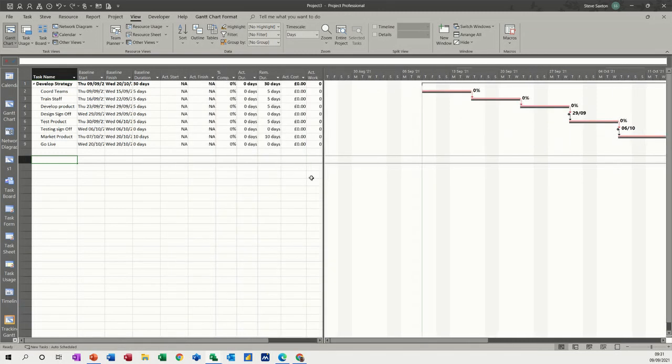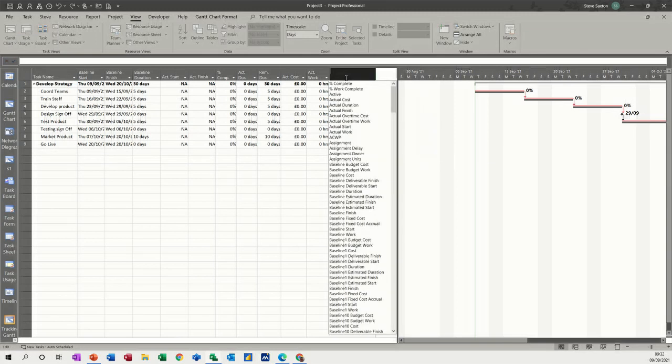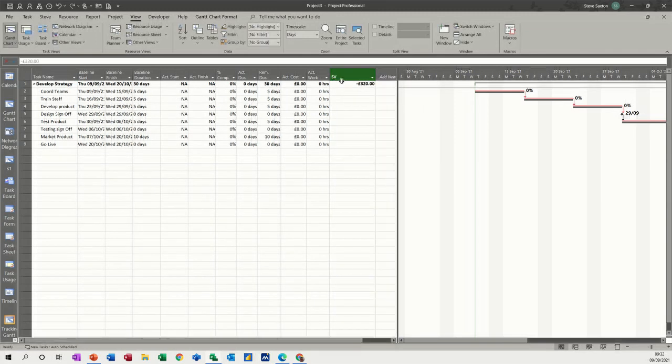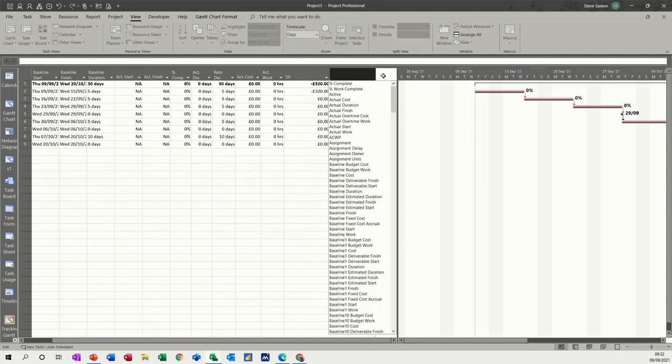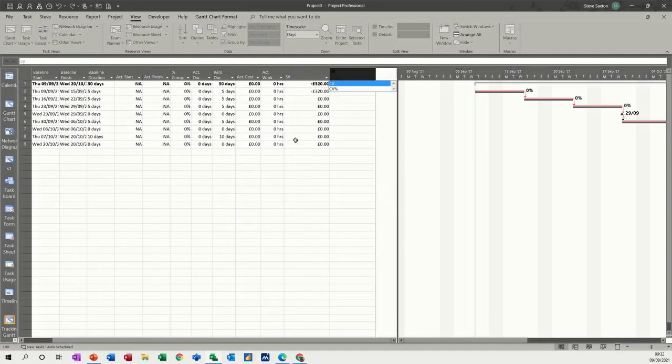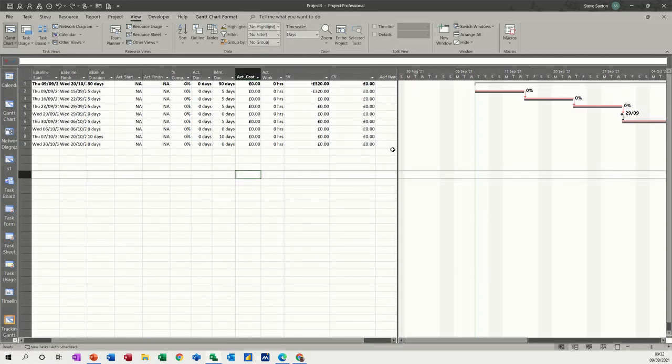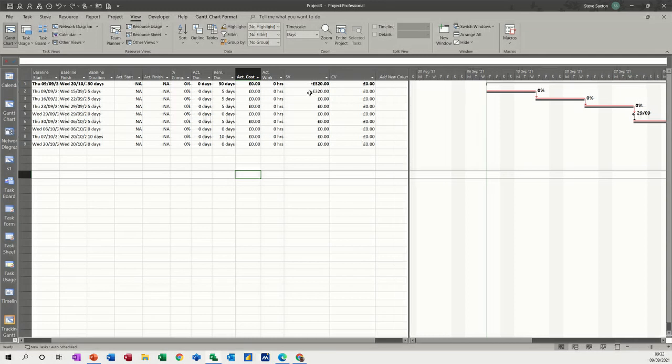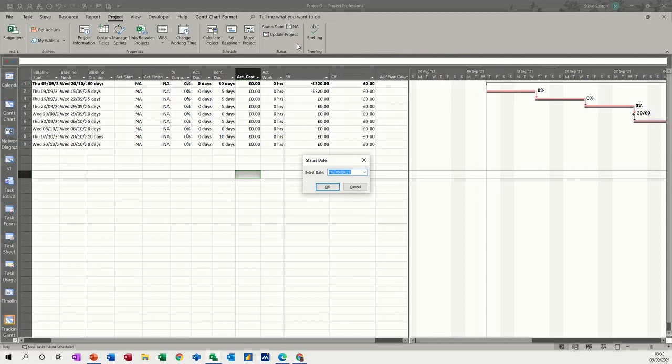We're ready for that. Now you can add extra columns, so let's add the SV scheduling variance column and the cost variance column CV. I haven't spent anything, and this is all triggered by a status date. According to that, the status date is usually set as today. If I go and change that to the 15th, for example, you can see that I should have spent a certain amount of money.